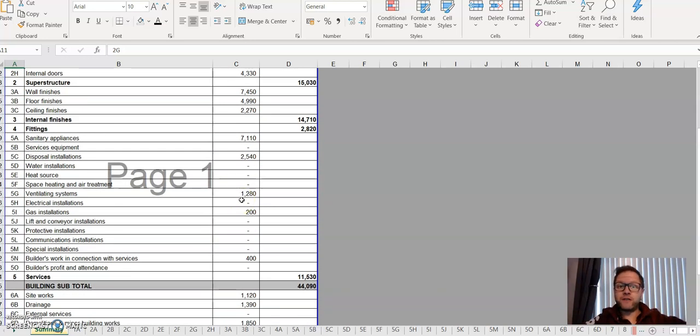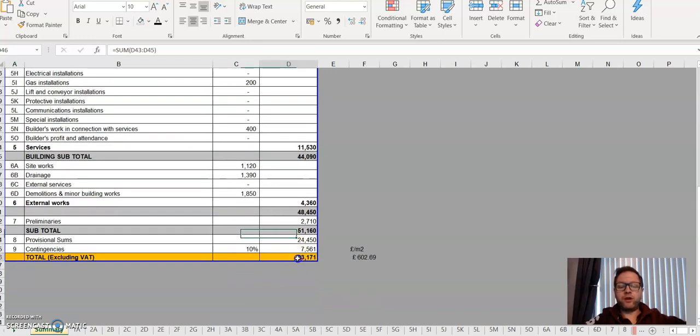So as you saw, I've only changed a few numbers. Go back to your bottom. I'm already on 83,000. This will be a VAT registered builder. I'd be shocked if any builders aren't, because even a 20 grand job, 4 jobs throughout the year, which should be easily achieved, you're on 80,000, you're already close to the VAT threshold. Okay, so 83, check your VAT rate. Is it 20%? Is it 5%? Add that on top. So straight away, you can see from 100 plus, let's just say 20% VAT, 120 to 83 plus 20% on top of that. So already you're chunking the numbers down.